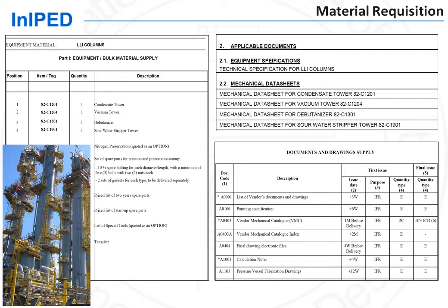For individual equipment such as pressure vessels, the information shown on the mechanical data sheet combined with the specified design and construction code is sufficient to fully define the technical requirements, and no other documents need to be prepared. However, for equipment with an extended scope of supply, such as a turbo compressor set, and for package units, a specification needs to be written to precisely define the scope of supply, services, and all technical requirements.